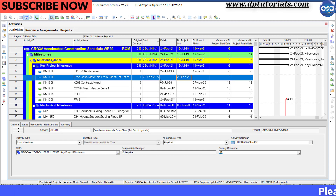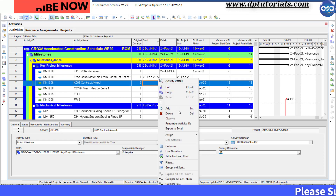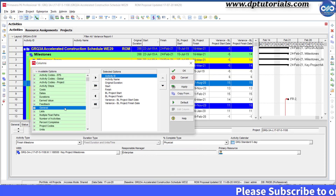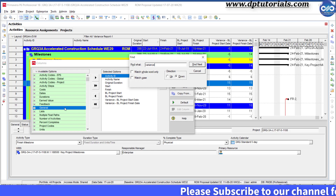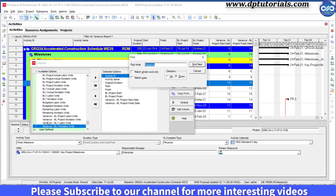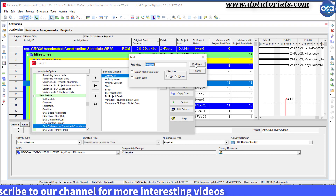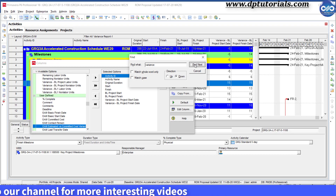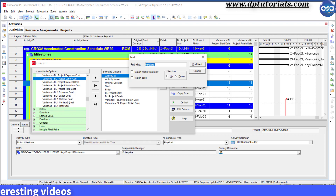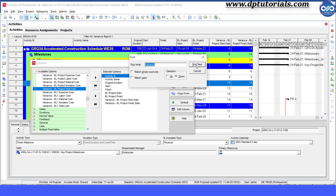Similarly, you can create other types of variance reports like cost variances, variance of labor units, accounting variances, etc. On a weekly basis you can generate these kinds of variance reports. Therefore, if you want to find out how your current project is performing compared to the project's baseline, you would look for variance reports and publish them to your management frequently.